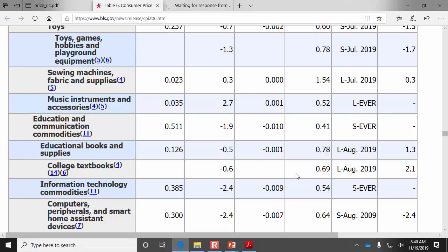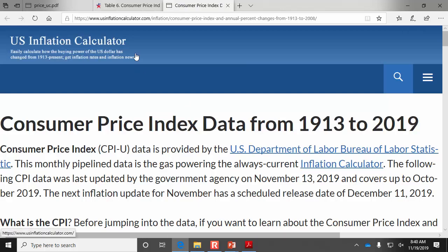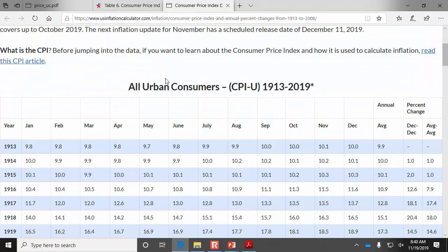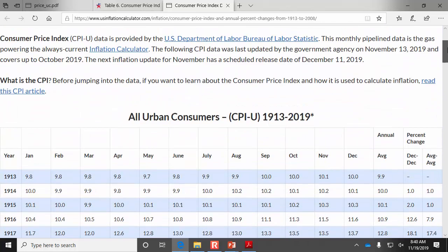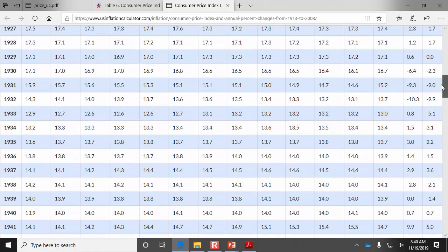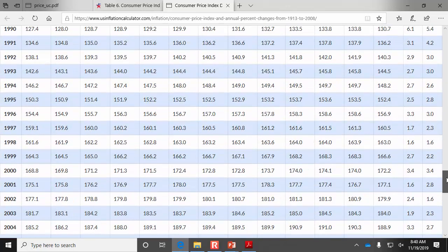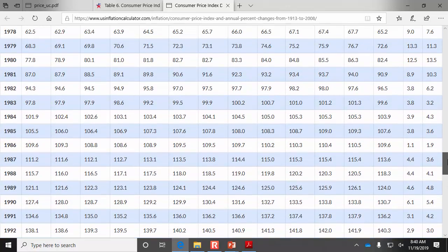This is a good illustration of how you can deal with the cost of inflation: look at how the consumer price index is adjusted over time. In the same way that the construction price for a single house was taken to a baseline of 100 units in 2005, it looks like this cost index has as its baseline year 1984, maybe 1983.